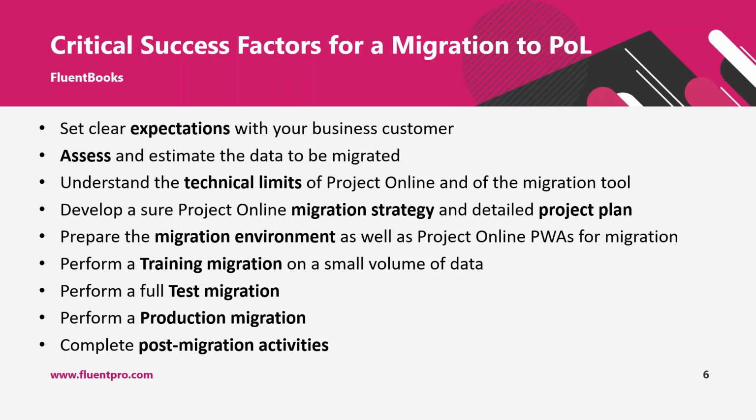Before you create a final project plan, a very good exercise is to do a test migration during which you can see how fast and how well data is being downloaded and uploaded, since every environment is different and there are data specific items that will need to be addressed. And after test migration is done, you will have better understanding of what specific steps you will need to take in order to migrate your data and how long it will take.